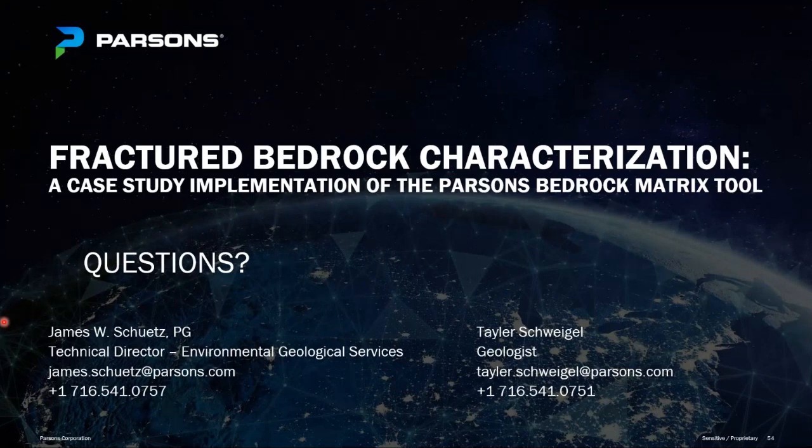If I wanted to, at that point, I even phased out regular geophysics, and we just self-performed fracture aperture or borehole aperture, because again, at that point, I was confident the aperture test was really something that we could self-perform, and we didn't need to bring in a geophysicist team for a $10,000 mob charge and $5,000 a day. So I hope that answers your question.